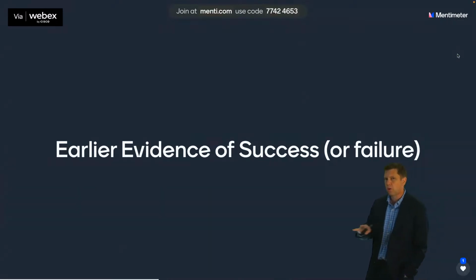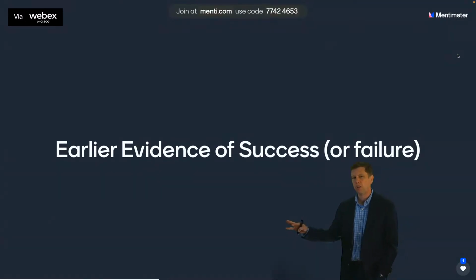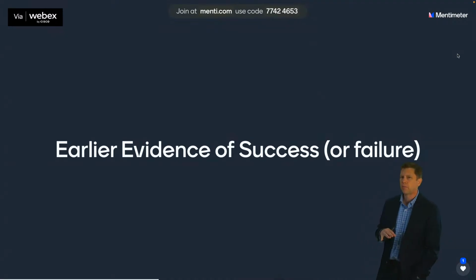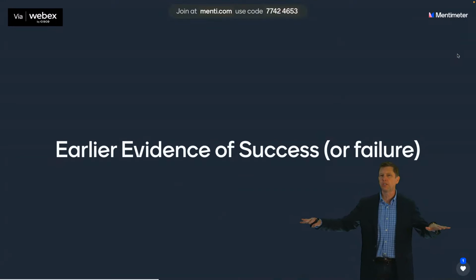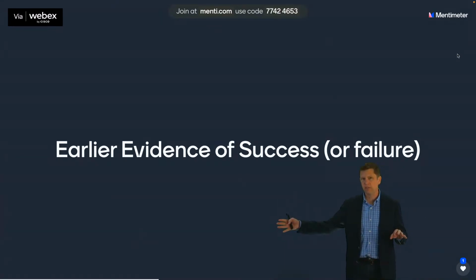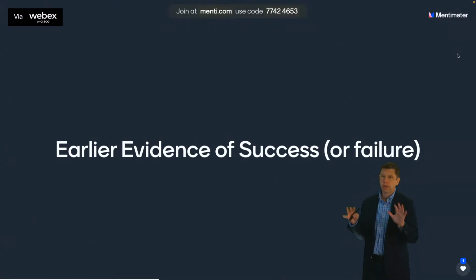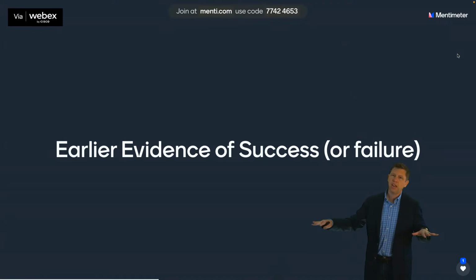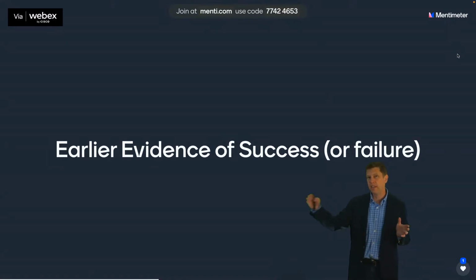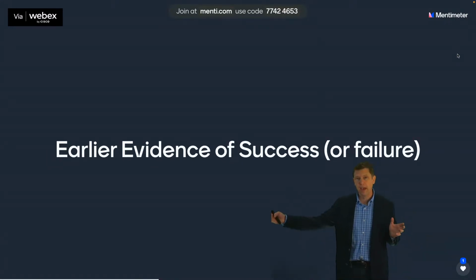So there's all this work we want to do before we start working on stuff that the customer can see. So we're going to build all this foundation out first, and then we'll start on the software pieces of it. So let's say they expect it to take 3 years, and this foundational work is mapped out to take a year. Well, that means you're not really going to have any evidence that anything can be produced till at the end of that year, and even beyond that, right?